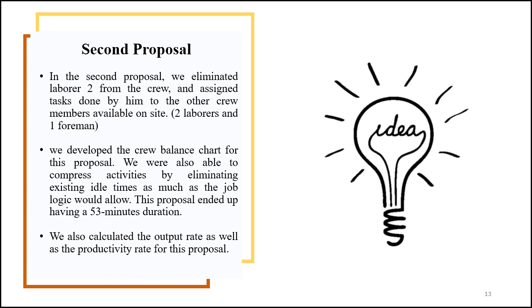We developed the crew balance chart for this proposal, and we were also able to compress activities by eliminating existing idle times as much as the job logic would allow. And this proposal ended up having a 53 minutes duration. We also calculated the output rate as well as the productivity rate for this proposal.